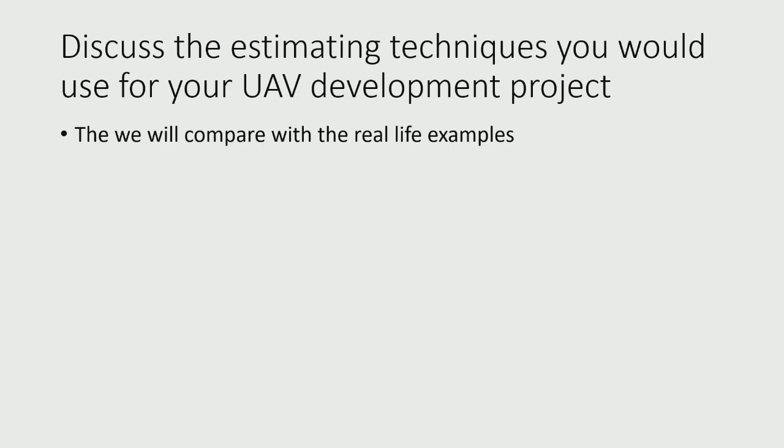So for your decision making at the beginning, in terms of design, or early-level planning, or optioneering, in terms of which way you're going, what the project's going to do, or what it's going to look like, then you need more top-down estimating because your cost drivers are very high level. Your project definition is not very granular. So analogy and parametric make sense. You always have subject matter judgment as well. So you've got an expert or a set of experts who will give you the answer based on their experience.